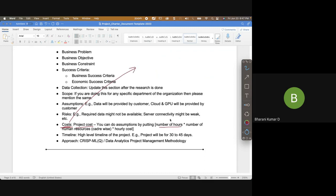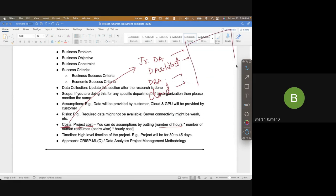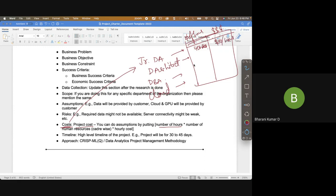Then there are the costs associated with the project. Usually you look at the number of hours: say you have a junior data analyst, a data architect, a database administrator, and a cloud administrator. For each person you figure out how many hours they'll spend and what the hourly rate is. For example, a junior data analyst might spend 40 person-hours at $10 per hour — multiply to get the total cost. You can also include software licenses and hardware costs.